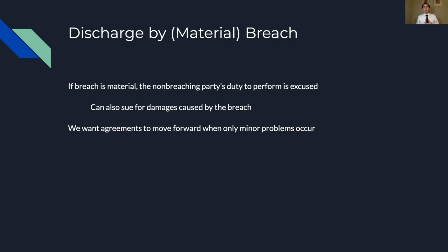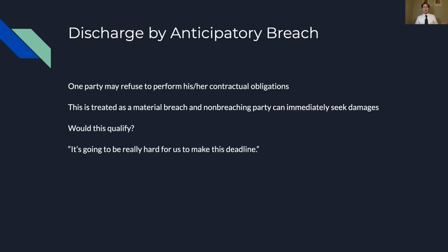So again, if it's a minor problem, that's substantial performance. We're going to go forward. If it's a material breach, it's over. And so that's, I think, the right way to look at material breach, it releases the other party from their obligations under the contract.